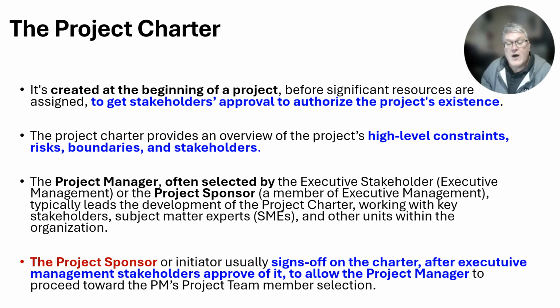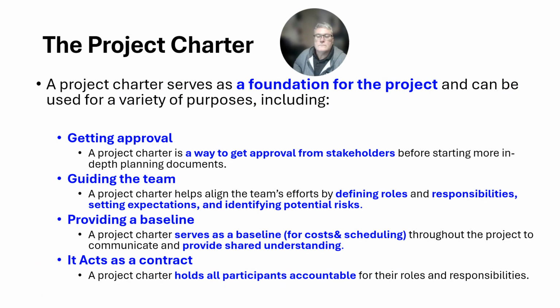The project manager, often selected by the executive stakeholder or executive management, or the project sponsor, a member of executive management too, typically leads the development of the project charter, working with key stakeholders, subject matter experts, and other units within the organization. The project sponsor or initiator usually signs off on the project after it's been reviewed and the stakeholders approve it to allow the project manager to begin the project and develop their project management team. The project charter is a foundational document to any project.